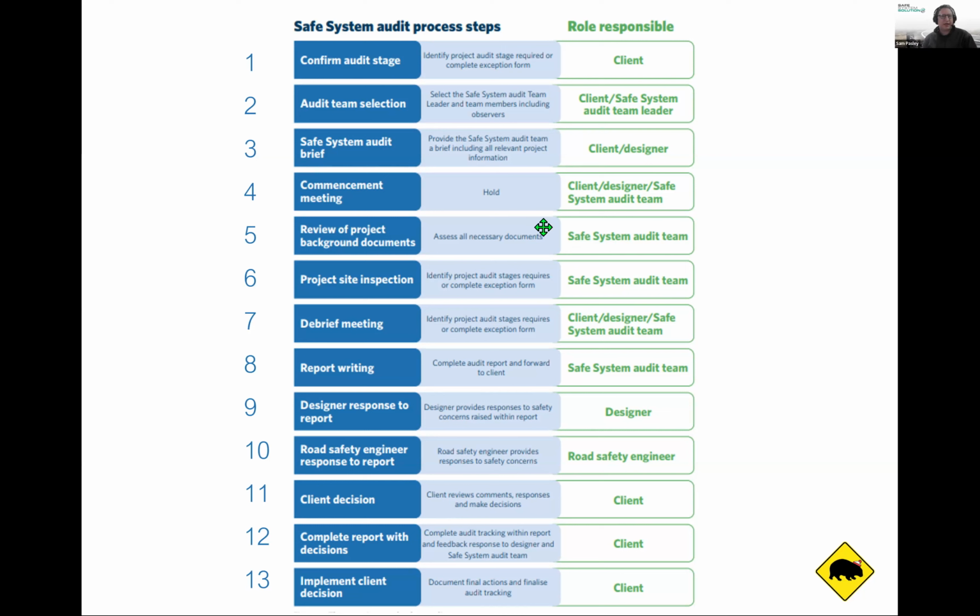Exactly. So that's something that the client does. Some councils around New Zealand have actually defined in their policies when they will be doing safe system audits. So they've said scheme design is kind of the ultimate, and then when the project gets a bit higher in complexity, they'll do it at multiple stages, and post-construction. So really, it's what stage of the project you're at that determines what you confirm the audit stage to be.